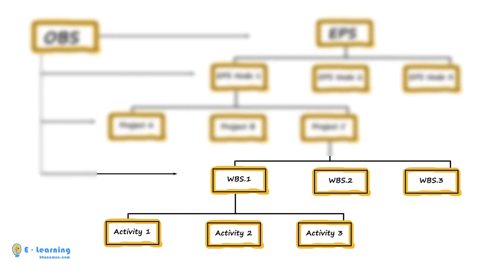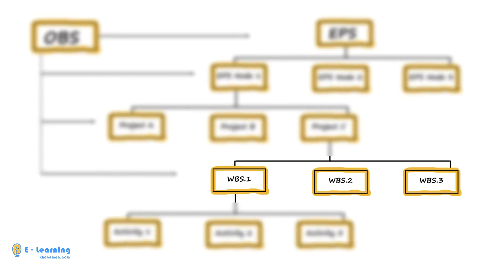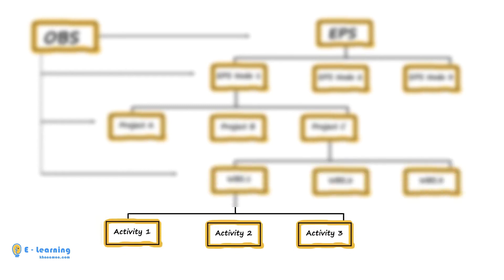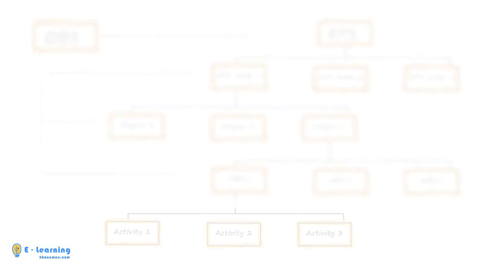Adding activities is the next step after WBS. When you have created work breakdown structure in P6, you will insert activities under that WBS.